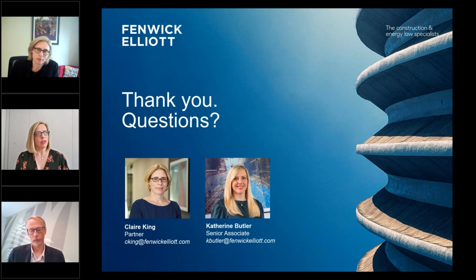Well, a variation post PC that alters the employer's requirements is a little sticky because you've achieved practical completion. So I'd be surprised. In terms of an obligation, I don't believe there is one, because you have complied, you've delivered what you contracted to. But you're more focused in the post PC period on remedying the notified defects as opposed to a variation. You are obliged to fix properly notified defects, but if you don't, the consequence is that your contract sum is reduced accordingly. If you don't undertake it, then you'll get the cost of what it costs the employer to get someone else to do it.